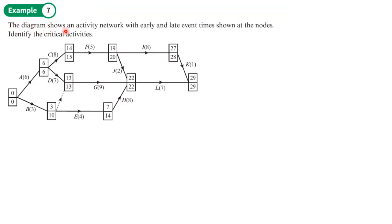Example seven: diagram shows an activity network with early and late event times shown at the nodes, identify the critical activities. So first of all, I'm going to identify the critical events. I will highlight those. So remember, they're the ones where we've got the same number in the bottom and the top box.